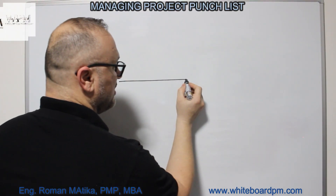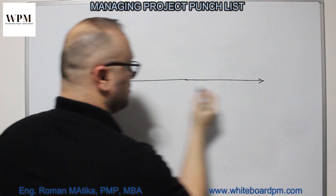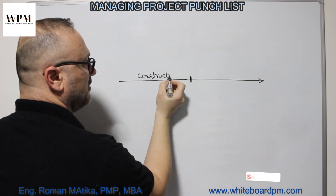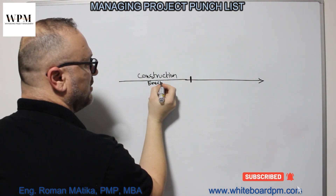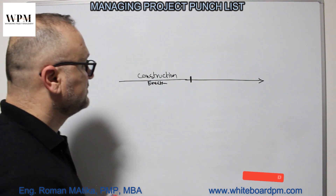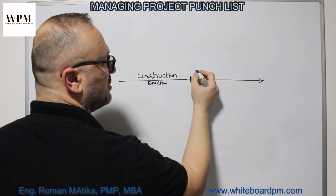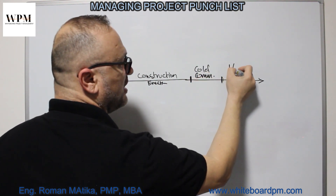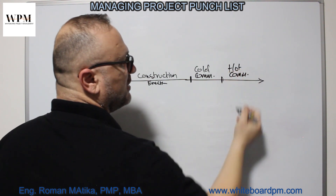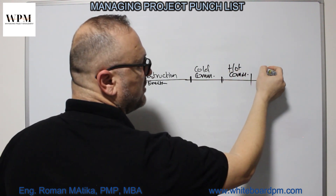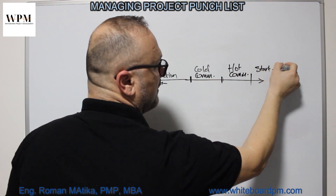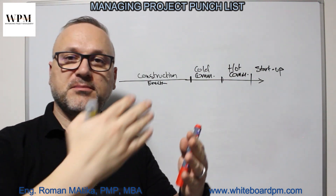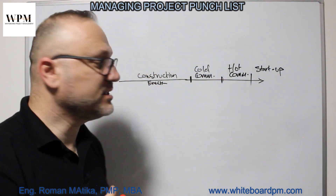We have the timeline of the project — we have the construction phase, the erection phase where everything is mounted on site, then the cold commissioning stage, then the hot commissioning stage, and then the startup stage. In each stage we complete some part of the project and hand it over to the client.